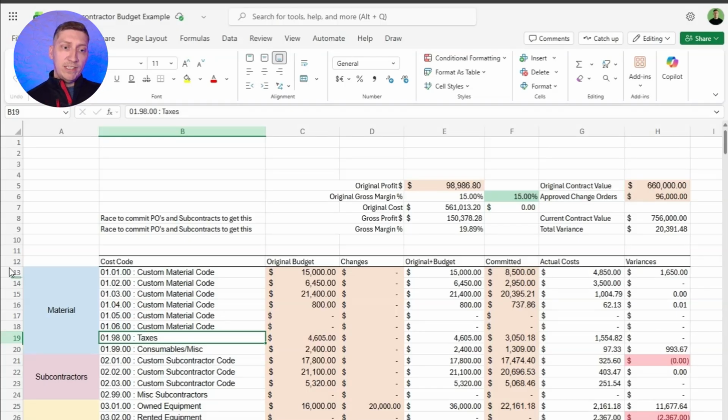So what we did is we decided we're going to put in flow fill, which, if you don't know much about concrete, is basically like sandy concrete that hits a certain compaction, around 99% within the first 5 hours. Well, that's perfect. So we put that around there.